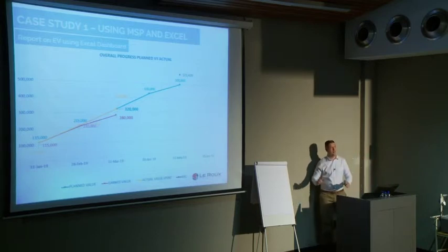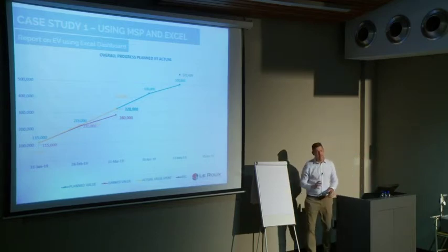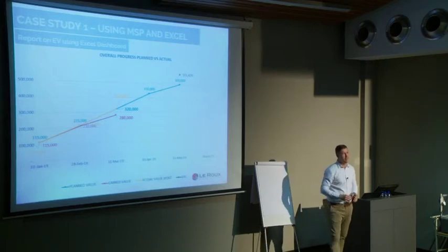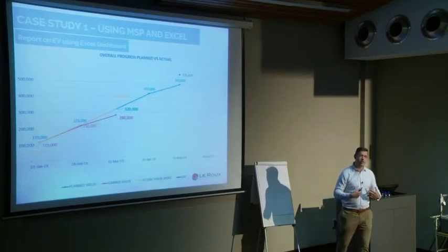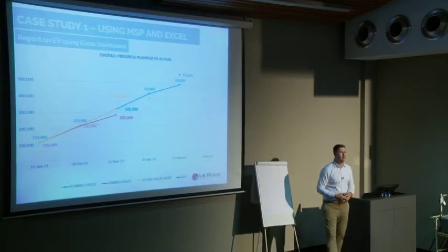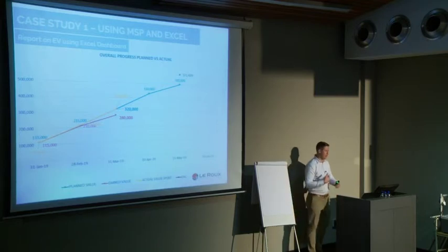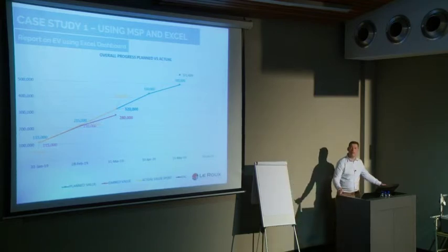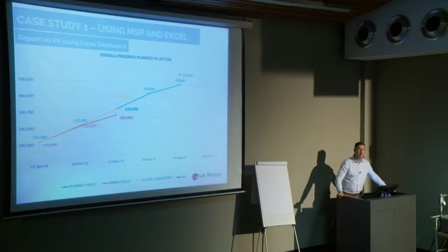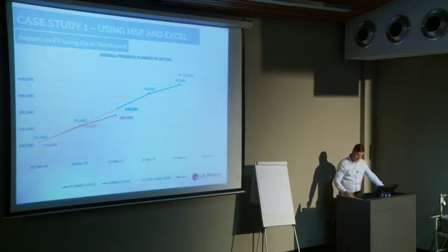All right, so earned value, there's a cog in your mind that needs to shift. And the more you use it, the quicker you will obviously be able to find those metrics. So if I look at this, I can immediately say, behind progress, and I look at earned value, and I look at actual, and I say, definitely we are going to overspend. We are paying these guys more for the effort than the completion that we have earned.